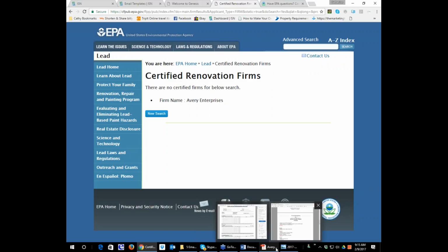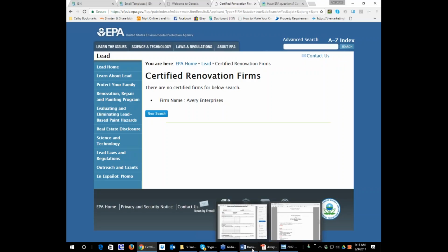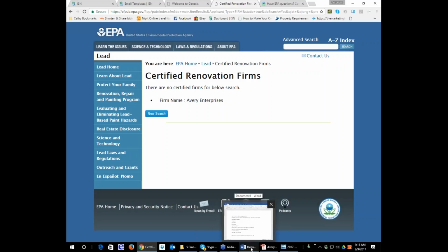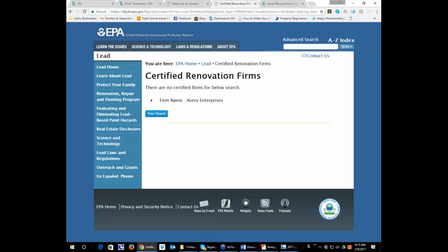But I want you to think about what you're doing. So at this point, this project needs to go to a feasibility study. But I can't do the feasibility study. I don't care about his proposal. I need the floor plan, so I know what size he's going to make these rooms. And if the contractor he's working with will give me that information, any other contractor I need to have bid will be able to take advantage of that information. Does that make sense? If that contractor is not valid, that's not my fault. I'm going to make him do the work for me.